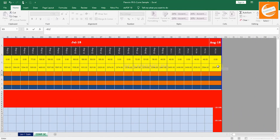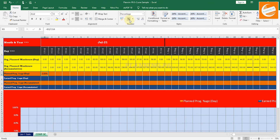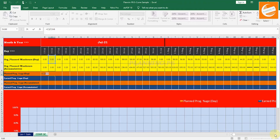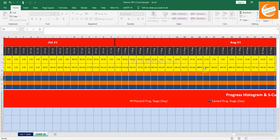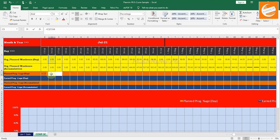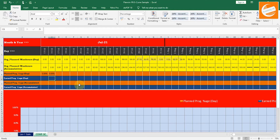To calculate the percentage per day, use the formula: per day manhours divided by the total cumulative manhours at the end. This will calculate today's percentage value. If there is no percentage sign, apply the percentage format. Copy that formula and paste special — formula only — selecting the last cumulative manhours cell for the project. Then modify the formula by adding dollar signs to fix the reference, press Enter, and drag that formula to the end.